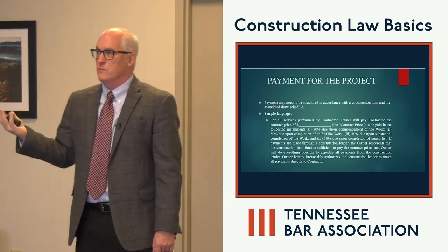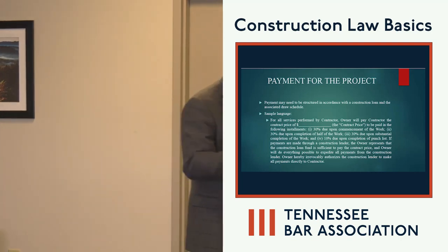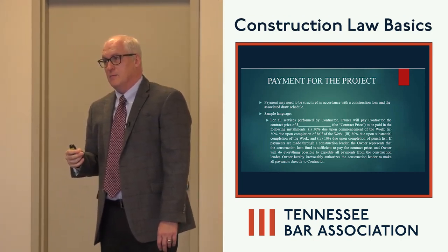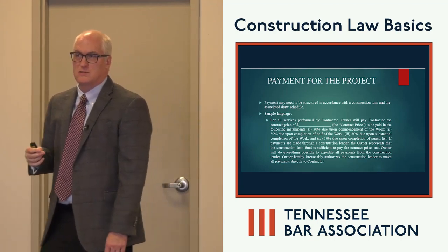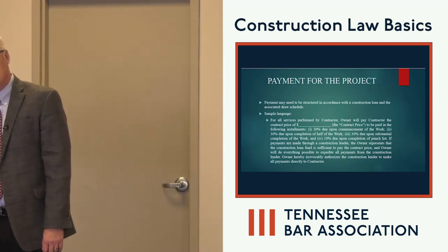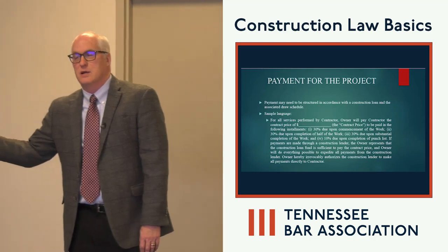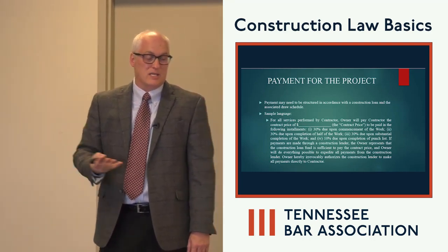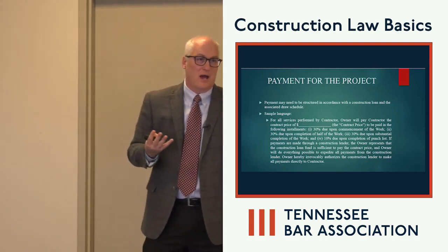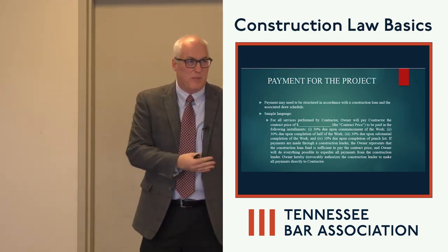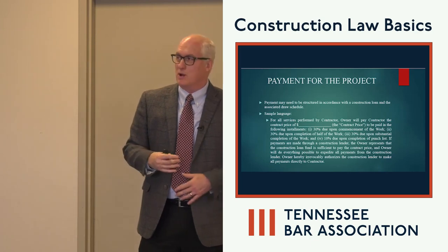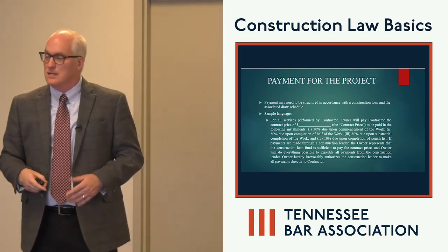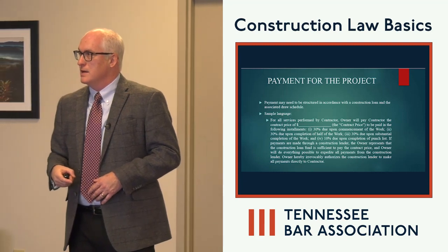It was kind of interesting, and there's a lot going on with it, but I just got involved. For whatever reason, draws were made on this particular lake house, and about 90% of the draws have been taken for what was reported to be the contract price, and only about 50% of the house is completed. You guys probably see that a lot too. I don't know if that's somebody from the bank not going out and doing their job. It's probably a little bit of everything. Probably some contractor misapplication of funds. That comes up quite a bit as well.